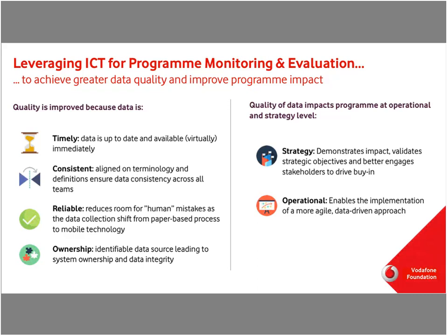A few months after operation and testing of this M&E framework, we identified some major challenges with this approach. Those challenges were mainly linked to the operational context and constraints in the field that Ali touched on, for example, in Dadaab refugee camps, and those contexts can be found also in other camps. What we found is that data using this manual M&E framework came in very late, and there were huge delays between the time the data is effectively collected in the field and the time we actually received it. And from time to time, the data could be either incomplete or inconsistent across the four countries we are operating in.